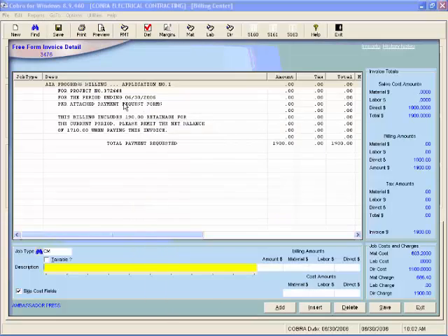And not everybody sends out the invoice with the application, but this is for to get onto your accounts receivable, and this is what it looks like. Because I'm doing a full retainage, what this is saying is that this includes the retainage for the current period. Please remit the net balance of $17.10 when paying this invoice. So that's kind of cool.